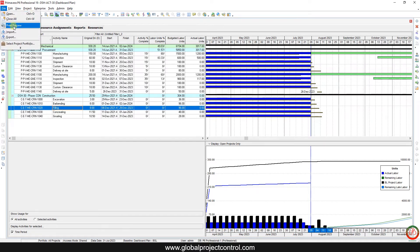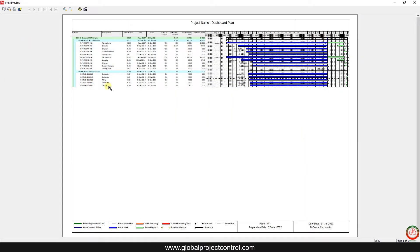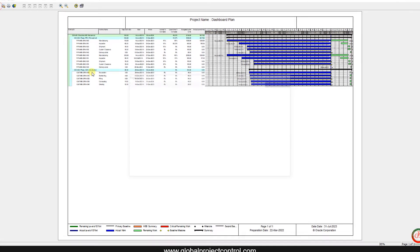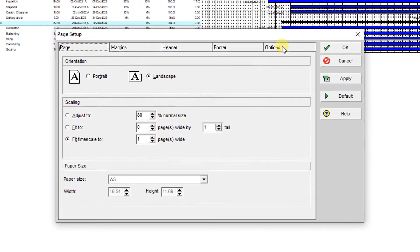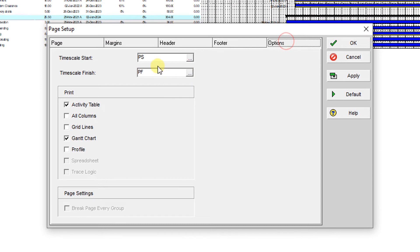So I go to the file by print preview. As you see, it is not good to print it out like this, so I go to the option. From the option menu, I need to type data date minus one week.